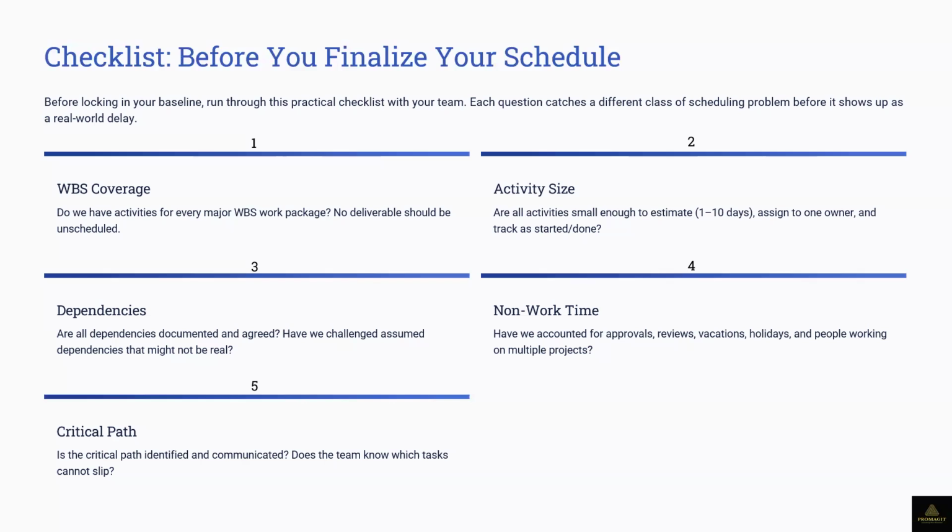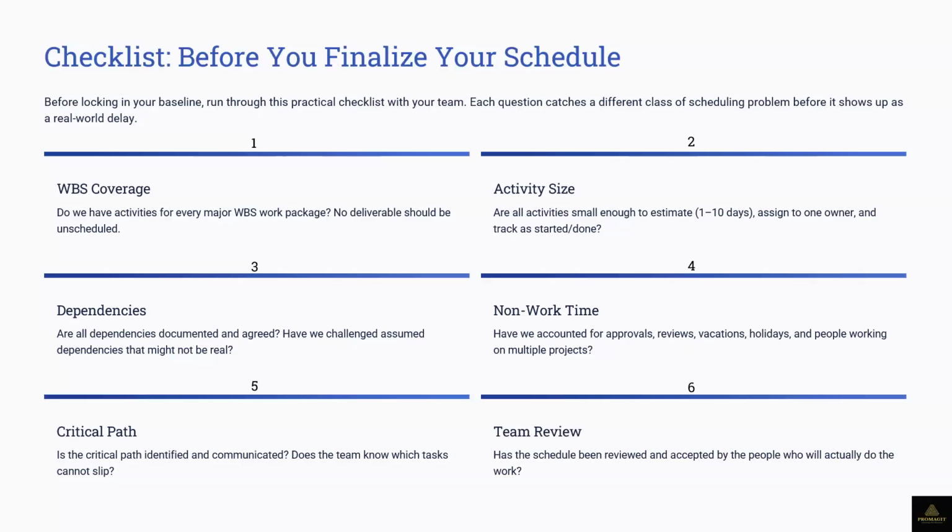There is a lot of real life stuff that we practice on that. Okay, please, when you build your schedule, let your team review it before you send it to the client. The team has to review, and this is very important for us as project managers. Once that schedule is built, there must be total buy-in, because you are not the one doing the work. The people who are working in the field have to look at it and agree to it, because you are going to hold them to it.